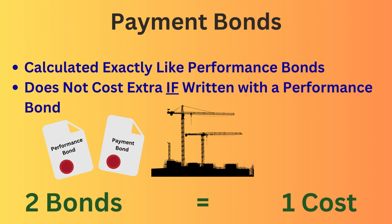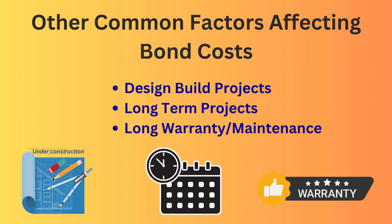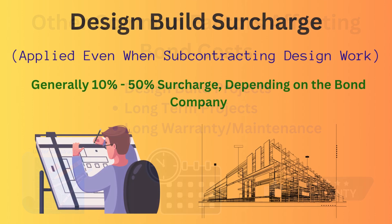Payment bond rates are calculated the exact same way as performance bond rates. However, there is only one premium when both bonds are written together. When a $1,000,000 project requires both a performance bond and payment bond, there is only one premium — in a sense, the project owner is getting twice the protection for one cost. However, only requiring one of these bonds does not reduce the cost. A performance bond with a payment bond is the same cost as a performance bond without one, and vice versa.